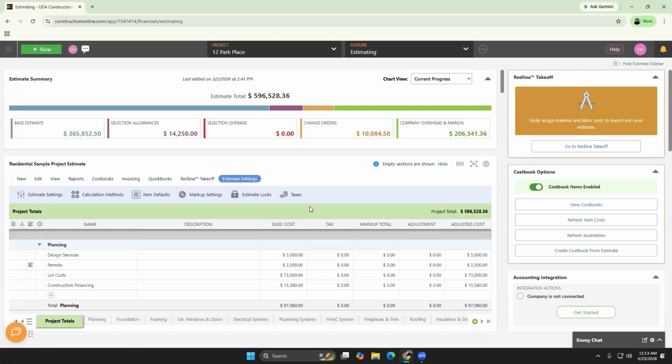So using a real world application here, Ivy, what I usually see is my clients will have one large master estimating template. This one large master estimating template will include everything that they are expecting to need in any job across the board. So, for example, if they do any sort of work where they are sometimes installing pools or they're sometimes doing special construction like elevator installs, it's not necessarily for every job, but on enough of them that they want to keep that naming consistent, especially if they're integrating with QuickBooks. They want to make sure that that is standardized.